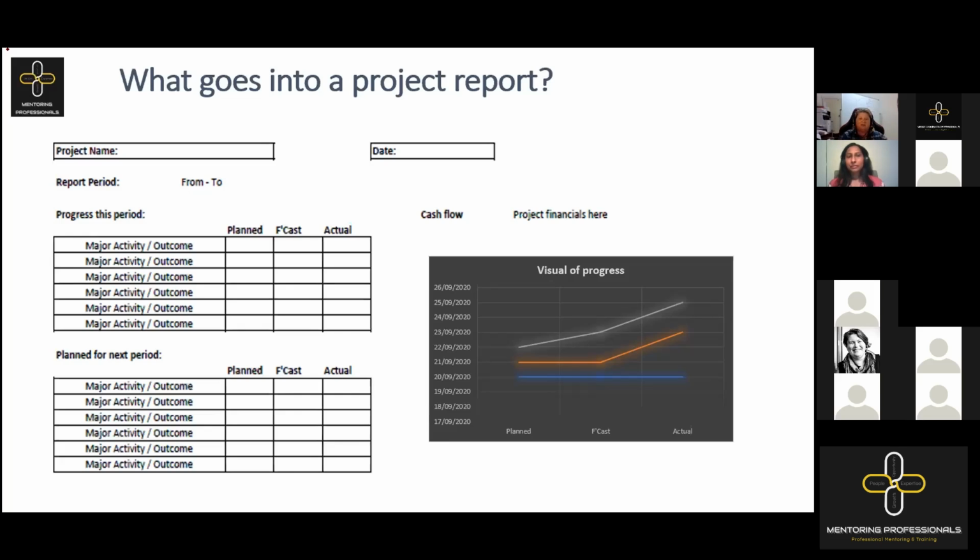Now, there's also a downside to lessons learned, because sometimes we don't want the teams working in a different way in that particular stage of the life cycle. We might need to wait until the next management stage to incorporate those lessons learned, because it could be a significant shift in the way of working that will cause more problems than it will resolve.